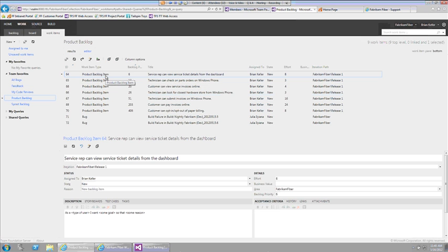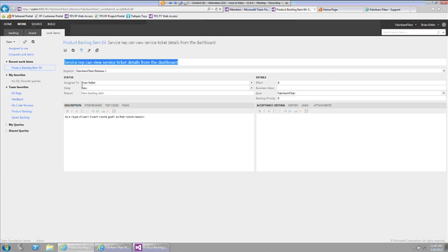So let me show you here in detail what a work item looks like. Here you have a title, and this one has a default format like a user story. So, as a type of user, I want some goal so that some reason is achieved. Now, it doesn't have to be like that, meaning that the product backlog item can follow any format for requirements. But normally in Agile, the best practice has been to use user stories. If you do have, for instance, a quality of service, you would replace this with a proper quality of service, like: I have to achieve a load performance of less than 5 milliseconds for screens A, B, and C. That would be another way of putting those requirements in here.